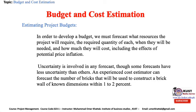The budget is not simply one facet of a plan, nor is it merely an expression of organizational policy — it is also a control mechanism. The budget serves as a standard for comparison, a baseline from which to measure the difference between the actual and planned uses of resources. As the manager directs the deployment of resources, resource usage should be monitored carefully. This allows deviation from planned usage to be checked against the program of the project, and exception reports can be generated if resource expenditures are not consistent with accomplishments.